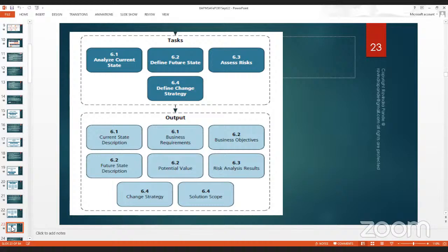In some scenarios, in a very remote destination, there could be a required installation of biometric. The roads are not good, so I might need to send these biometrics by courier, where I can shoulder my risk with the courier company, and I'll make sure they have SLAs with handle with care type documentation. So whenever they ship these biometrics, they use enough packing, or they might deliver it through a helicopter or a quadcopter or whatnot.